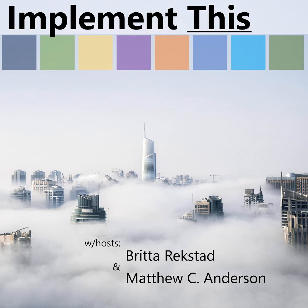Back on the documenting thing, something I was thinking about is that because I didn't have any kind of project management process in the beginning, I didn't build iterations of something and gather requirements and look back. I didn't leave myself a way to be sure I tested everything before an upgrade. Since I didn't do UAT when we rolled out new stuff, I didn't have a way to go back and say, does this all still work now that we've upgraded or moved servers or done something else? We had enough moves and changes that I had a sense of what scared me that might break, and I had users I knew would scream when stuff didn't work, and that was our process. That was very painful, and you don't gain a lot of trust in friendships that way.